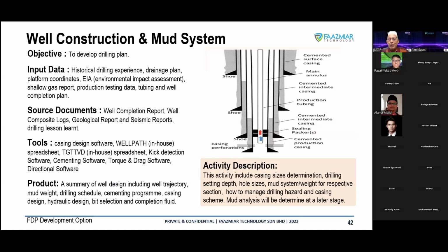So in our computation, our judgment, if the technology is expensive, but I can still reduce the time. So for example, the rig rate is $100,000 per day, and the total operating cost, including the helicopter, the supply vessel, the fuel, the third party, could be around $300,000 per day. So rig cost 100,000 plus 200,000 services and logistics is $300,000 per day.